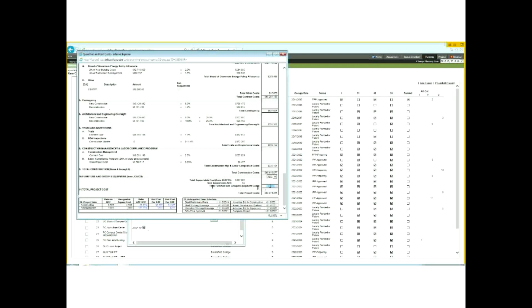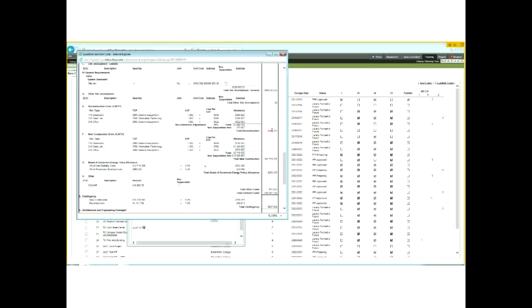Also over here in the equipment, there's red text, delete, mouse click outside, and then the information updates. Final entry will be the section 13, the scheduling. Go ahead and enter the information here. Without this information, the JCAF 32 won't populate. So this is actually an important piece of the Q&UC as well.